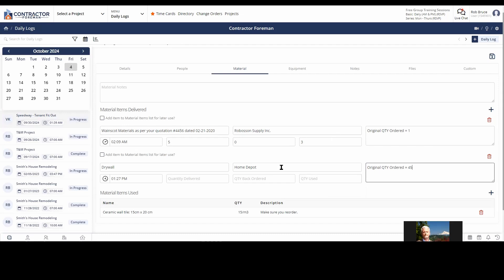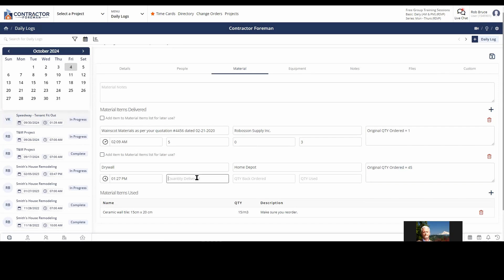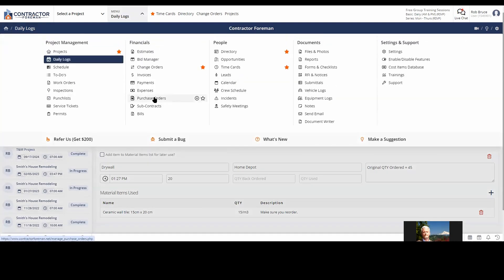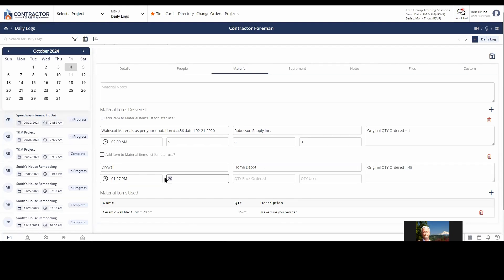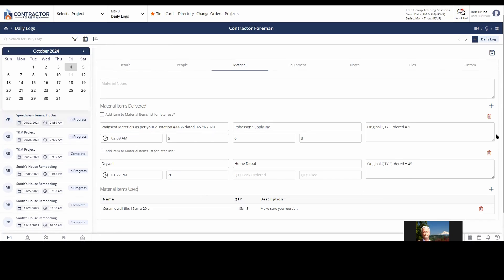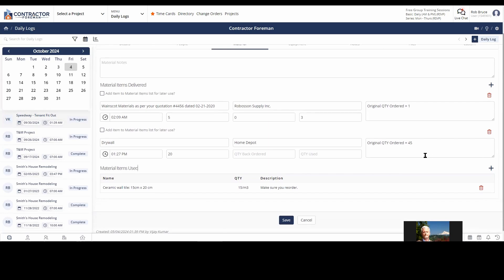And what that's doing when I type in, how much was delivered? So I had ordered 45, I guess sheets. So 45. So if I got 20 delivered, because I don't always get a full delivery. What it does is it talks to the purchase order because I created a purchase order for my sheet rock, drywall, miscellaneous, other sundries, on that purchase order. But for the line item on the purchase order, it's going to put in that, hey, we got 20 delivered. And that way people in accounting know to not pay for all 45 because we only got 20. So you're not going to overpay. Still pay the full thing if you wanted. Just giving everybody a heads up that we only got the 20.